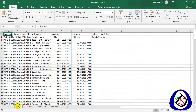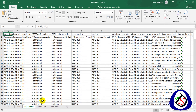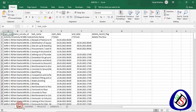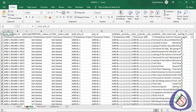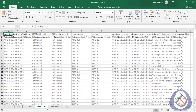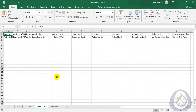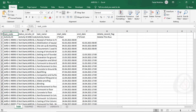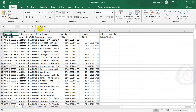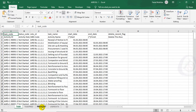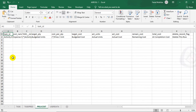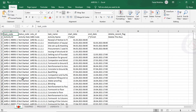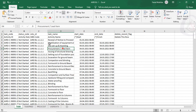On the desktop I open the exported file BL1. I can see at the bottom there are three sheets: the Activities sheet, the Activity Relationships (predecessors) sheet, and the Expenses sheet. In the Expenses sheet, the first column is Activity ID, the second is Activity Status, and the third is WBS Code — but there is no WBS code in the project cost sheet.